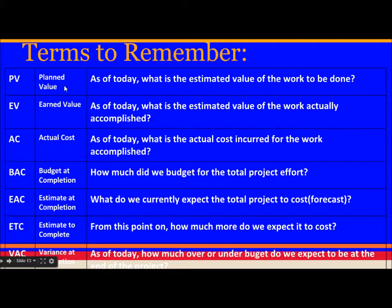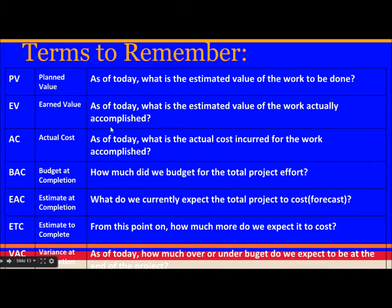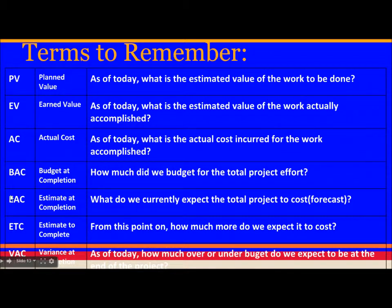Key terms to remember: PV (Planned Value) — as of today, what is the estimated value of the work planned to be done? EV (Earned Value) — as of today, what is the estimated value of the work actually accomplished? AC (Actual Cost) — as of today, what is the actual cost incurred for the work accomplished? BAC (Budget at Completion) — how much did we budget for the total project effort?